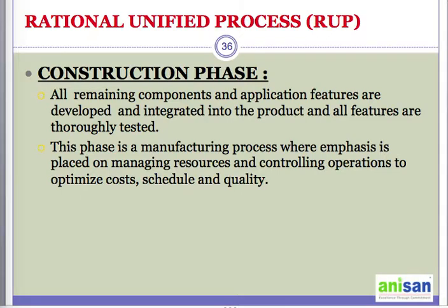Okay, now let's talk about the construction phase. In the construction phase, we start building the components. But that only will happen when the architectural diagram is stable, and based on the stability and the stakeholders' approval, we go to the next phase. That's the construction.